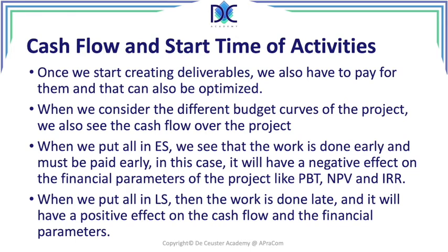On the other hand, when we put all in the late start, the work is done late and it will have a positive effect on the cash flow and the financial parameters. Now, we have a problem here because when everything is in late start, everything is critical. And we may have to find a compromise. Like I said, we can find a planned start, which is between the two.